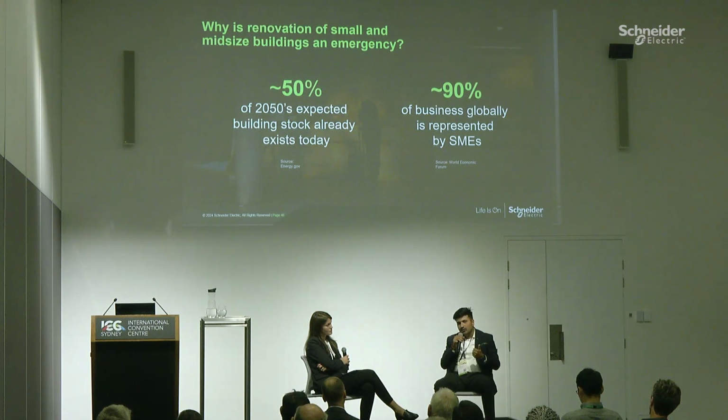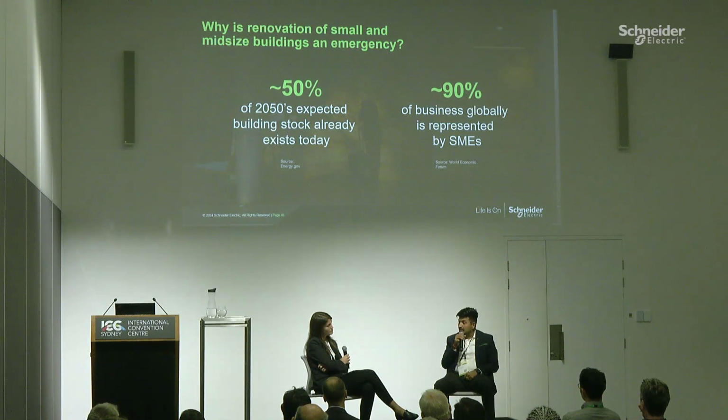The second one is majorly going to be the ease of installation and commissioning. Because these are multi-site, we're going to talk about standardization. I've been working in BMS for the last 20 plus years, and here the project life cycle would not be 6 months to 1 year. It's going to be in days and hours, because we're going to deploy across hundreds of sites. So the focus is on templatization of the solution. For device templatization, we need to move towards standard libraries. These are some of the major challenges that small and mid-sized buildings face compared to large buildings.